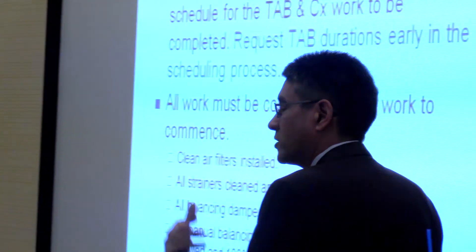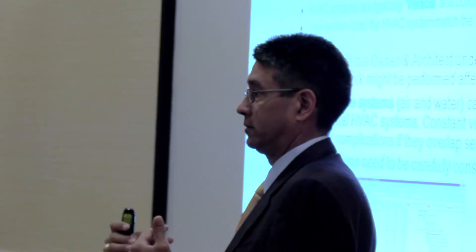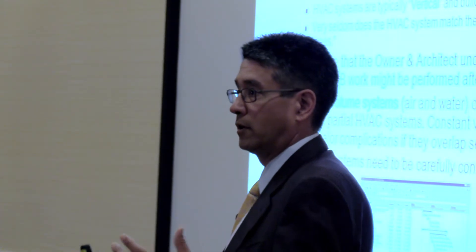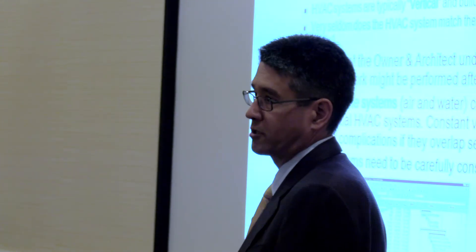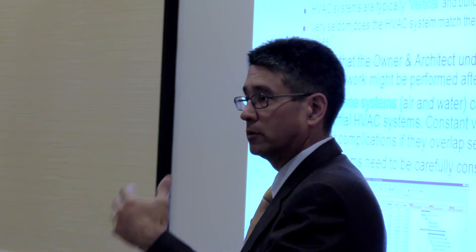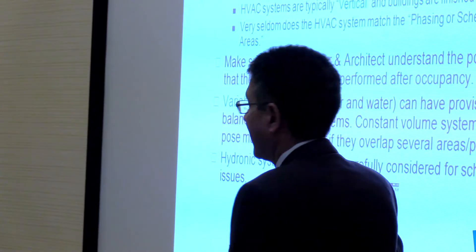Always talk schedule. The hardest thing most GCCMs and owners don't understand is that the majority of our work is done by system, not by area. Most HVAC systems are vertical, not horizontal like a building floor. They phase out a building by floor, but your air handler is sitting up top feeding each floor — on a constant volume system, how do you do a floor at a time if they haven't finished out the other floors? Getting involved early on scheduling and saying: hey, you're phasing the job, how are you going to do that?